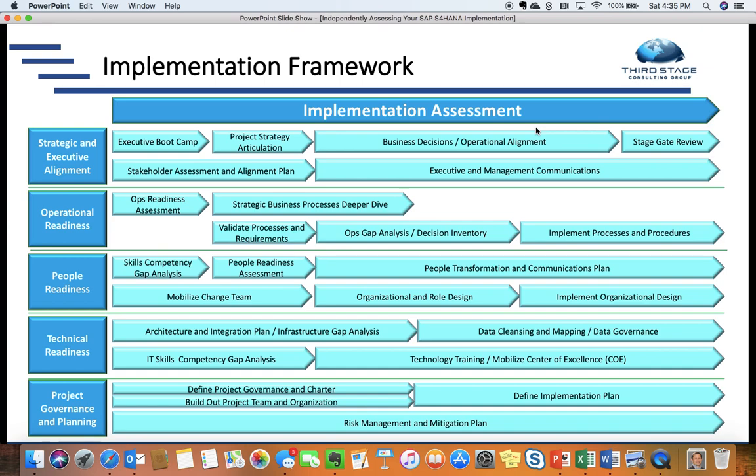And so when we're assessing projects from a QA perspective, a third-party QA perspective, we're coming in and looking at, were these things done and were they done well? Was it done effectively? And where are the risks and what are the things we can be doing to better achieve these things? So this is kind of our gap analysis, our perfect state, our suggested state, our best practice state of a project, whatever you want to call it. We're doing a gap analysis between that and what's actually happened on the project so far.